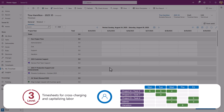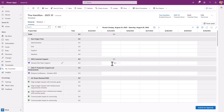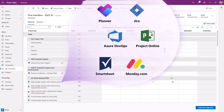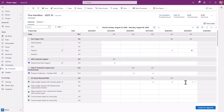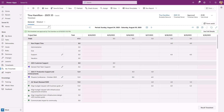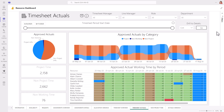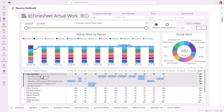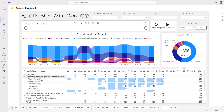Resource management level 3 is timesheets. Culturally, this can be a big ask for team members. We typically only see timesheets used in organizations that are either capitalizing labor or charging for their people's time. With the tasks and assignments from the various work management tools already synchronized into Dataverse, you now have a universal timesheet with assignments from all projects, as well as non-working and non-project categories. Team members can now track all their time across the week and add comments if necessary. You get to choose who has to fill in timesheets and whether these timesheets require approvals or not. If you decide to track time in your organization, you will get a lot of good data from it, including insights into how much time is actually spent on project work versus non-project or non-working time. You will be able to see where people are spending their time, as well as the amount of time tracked to specific projects or categories.